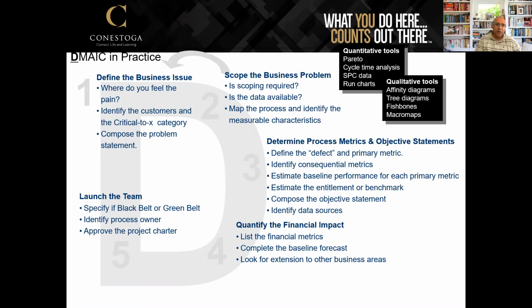The project charter will have where this problem is located, what the problem is, why it is important for the company, what our purpose is, what we are going to do, how much money you need for the project, how long the project will take, who the team members are, and you need approval from the sponsor for the project charter. That way you can start your project. So this is everything you have to do in the define phase.